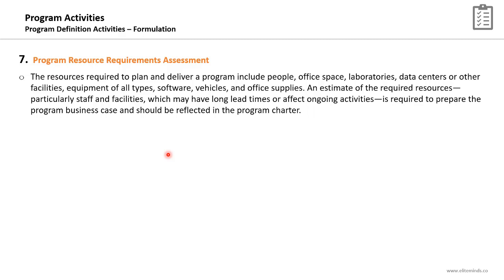So we need to consider human, physical, and financial resources in this estimate. An estimate of the required resources, particularly staff and facilities, which may have long lead items or affect ongoing activities of the program, is required to prepare the program business case and should be reflected in the program charter.